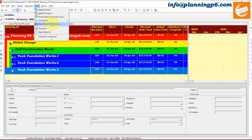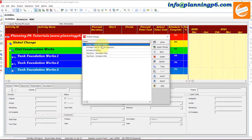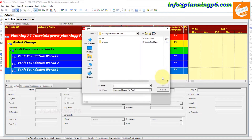Under Tools, alongside financial periods and stored performance, we have the Global Change option. You can add a new change, delete, or modify a previous one. You can also copy and paste, and there are import and export options for PLF and XER files — you can save as a PCF file and import it into another system to apply the same global change to a different project.